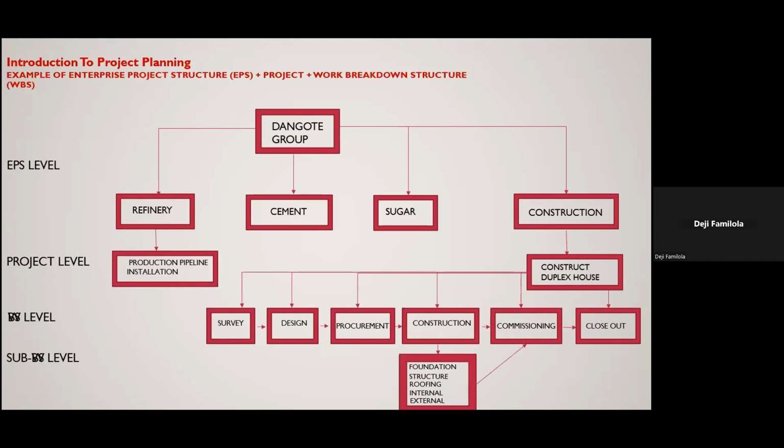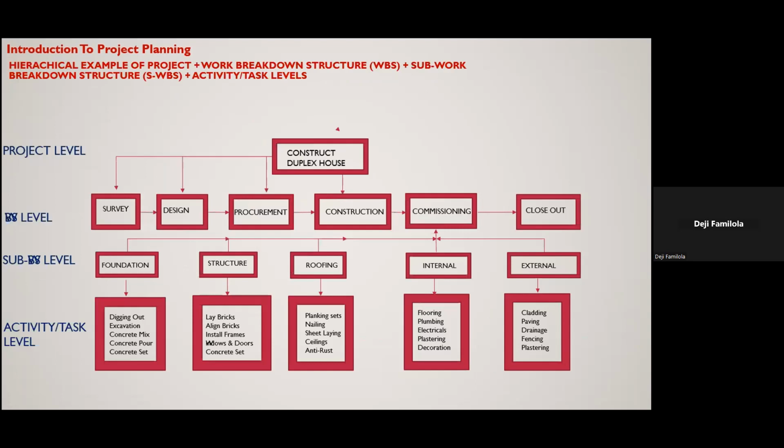So it comes to another level. From that level, it comes to what's called WBS. And WBS, if you look at where my cursor is, that's the enterprise to project to WBS, means work breakdown structure. And I will tell you the story about all that. I'll just give you an overview of the WBS level. Then it comes to activity level. Then it comes to the minute level, which is the granularity of planning, which is steps. But in most places you won't find it. People won't use it, but I've been in companies where they further break down.